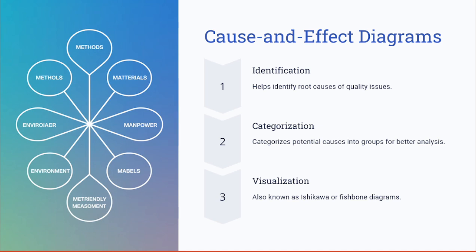Now, the fishbone diagram, or the cause and effect diagram, or Ishikawa diagram, can reveal issues like heavy or endless testing, or root causes like unclear requirements or insufficient resources. Using these fishbone diagrams, you keep asking yourself why this issue happens, 5 times, 6 times, 7 times, until you reach the root cause of the issue.